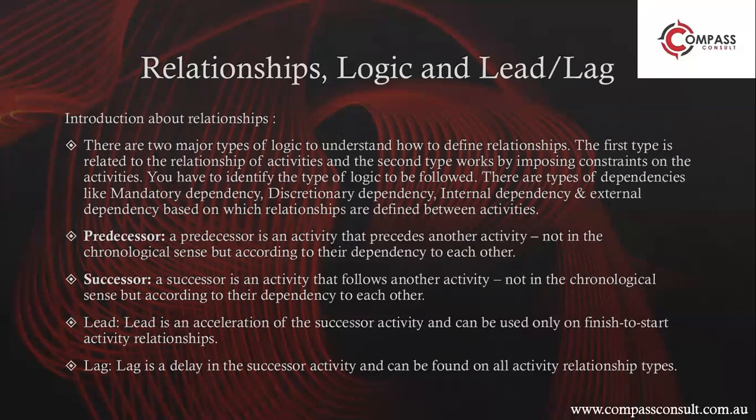Like if it is a milestone which is as per the contract, required to fulfill the contract obligations, you would be required to put constraints on it rather than relationships, because you need to make sure that these dates are tight, these dates are not moving from their respective plan.